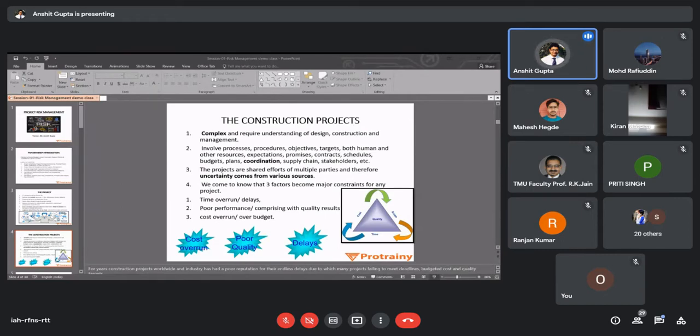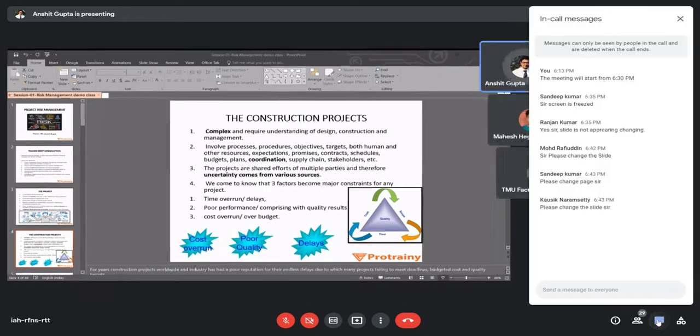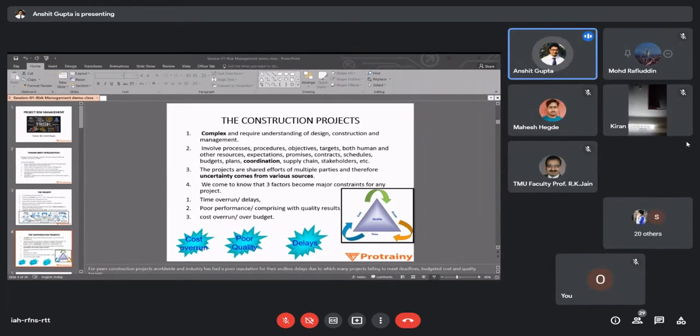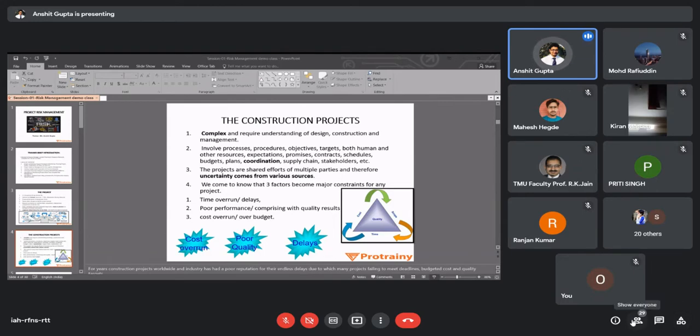So this will be a huge cost for your company and a huge reputation loss for your company. So this is an example. If the risk is not judged at an early stage, the amount at stake for your project will keep on increasing, and the opportunity will go on reducing. So this is just the risk versus project life cycle graph.